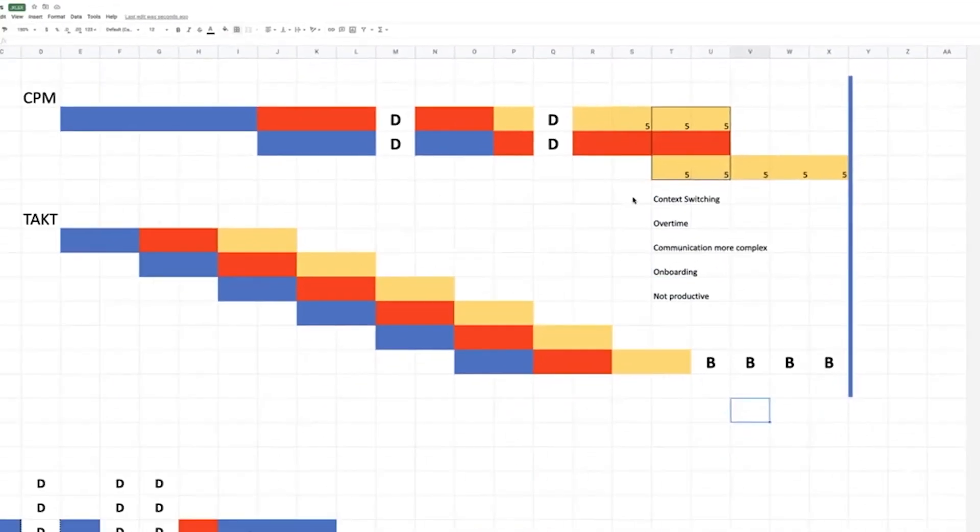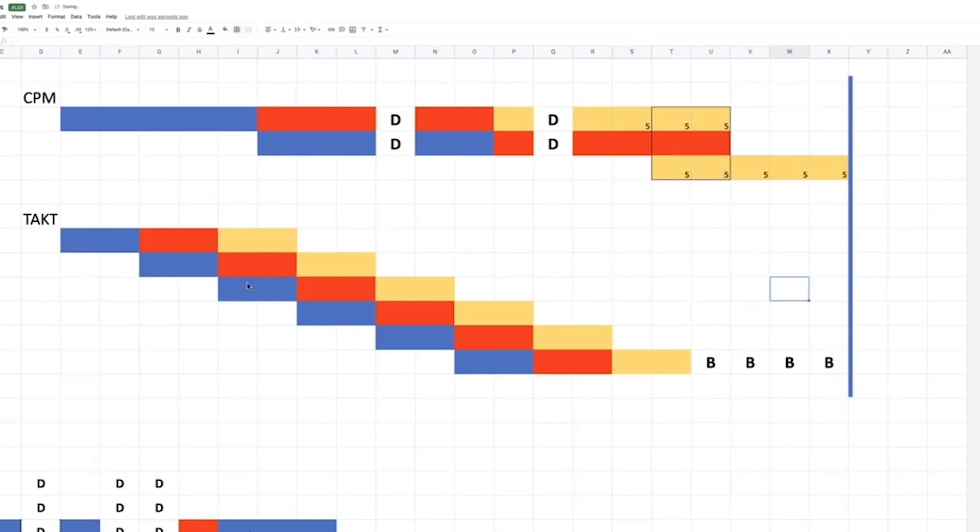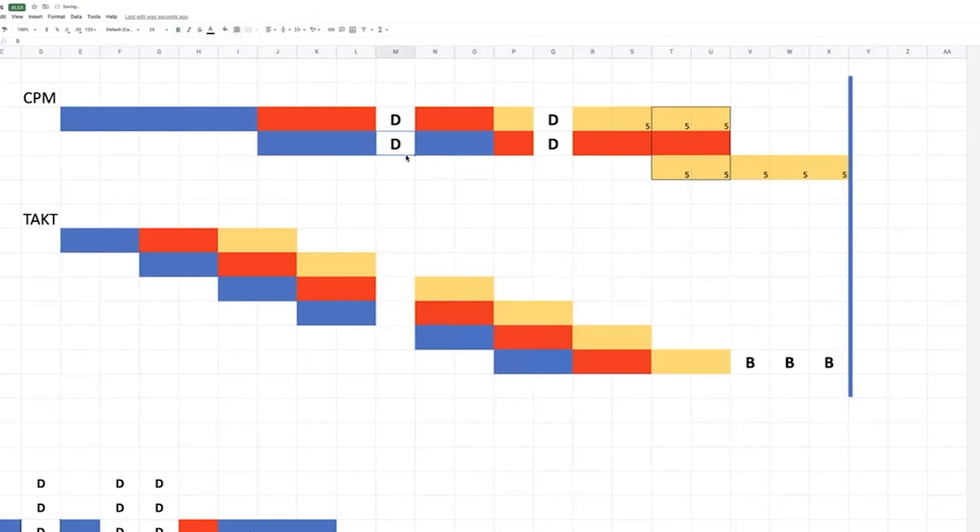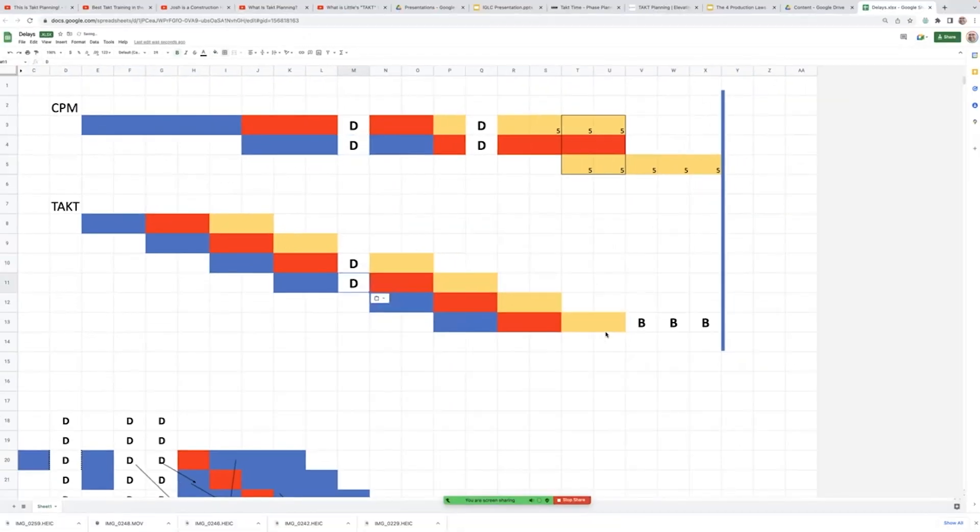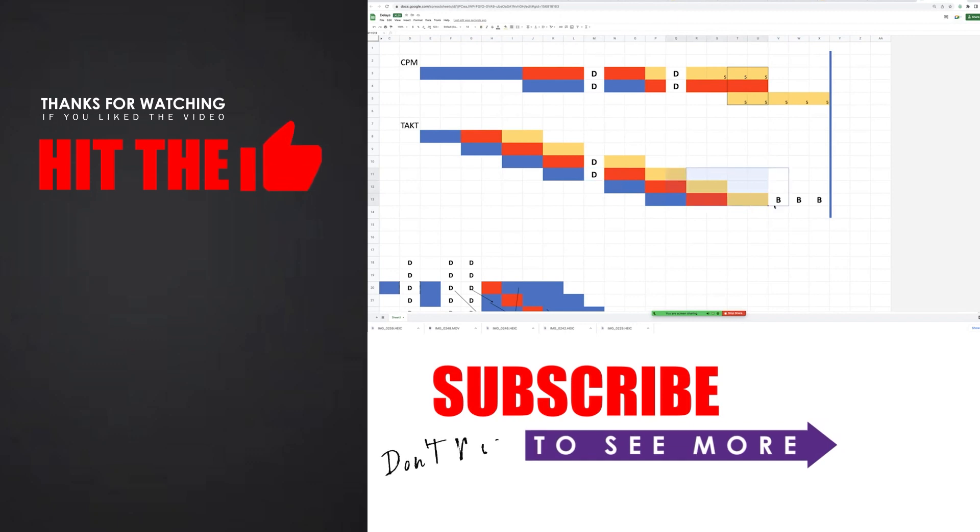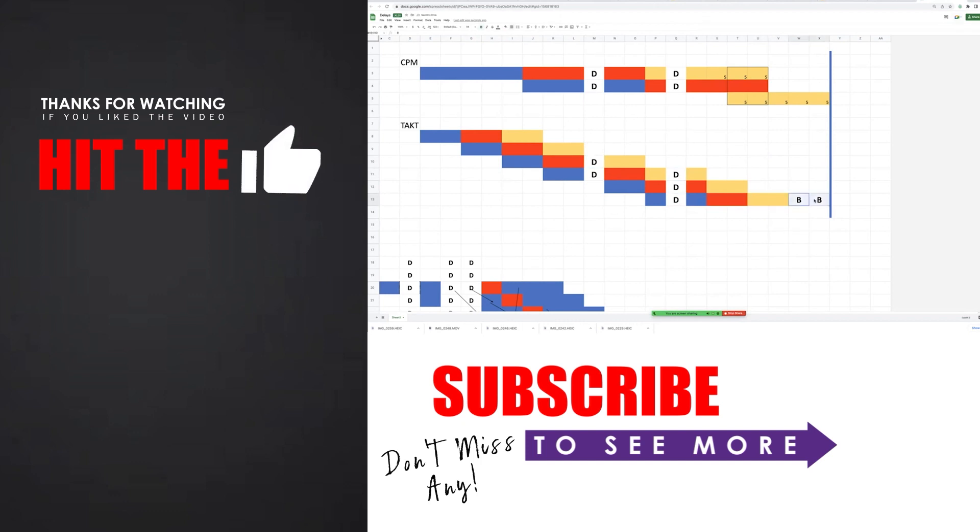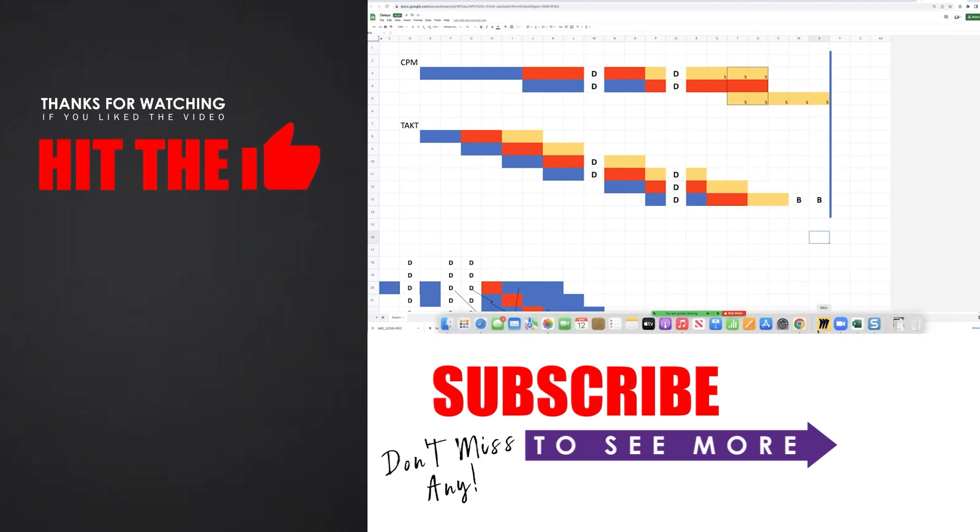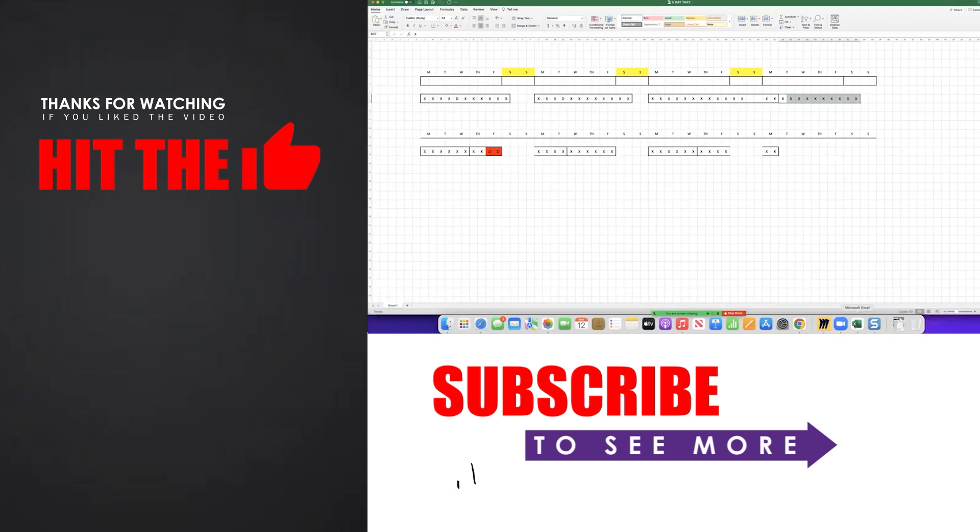Let's look at what happens in a tacted system or in a nimble system. Let's say that you have a delay and that pushes. There's the delay. We can move the entire sequence over to the right and eat into those buffers. Here's another delay. We move that sequence over. We pause the entire project and we move it that duration and we eat into those buffers. Guess what? We're not behind schedule because we were able to use those buffers.